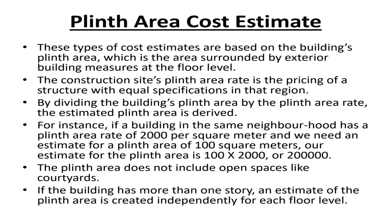For instance, if a building in the same neighborhood has a plinth area rate of 2000 per square meter and we need an estimate for a plinth area of 100 square meters, our estimate for the plinth area is 2 lakhs. The plinth area does not include open spaces like courtyards. If the building has more than one story, an estimate of the plinth area is created independently for each floor level.